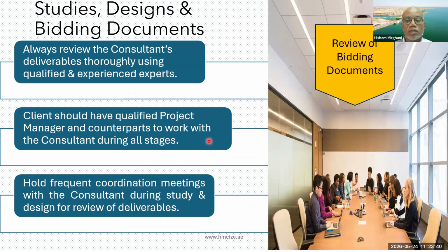Now, review of bidding documents is critical. We started on design of the subsequent projects only after the first dam had progressed substantially, which means that after 3 years of implementation of the first dam, we already had dozens of engineers who had gained considerable experience in design and construction of dams. And that meant that we now had the capacity to review designs.